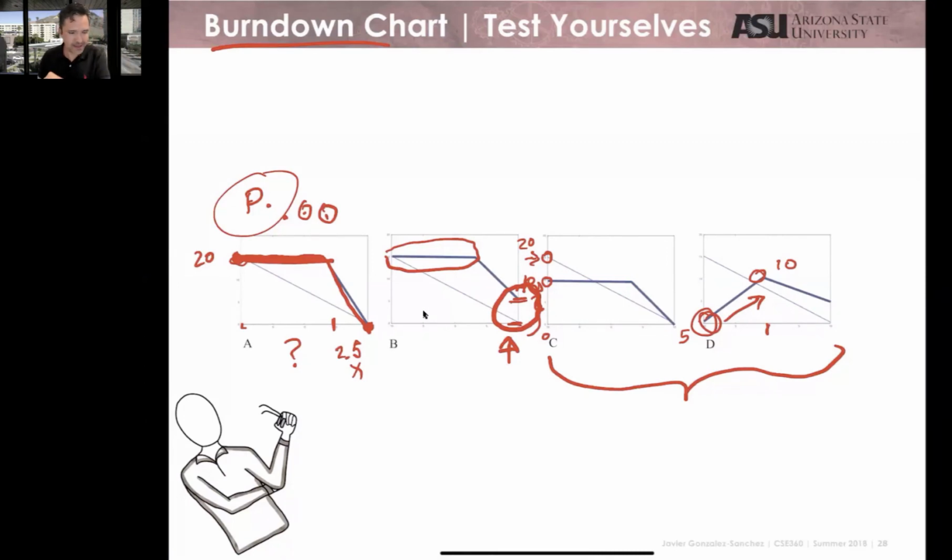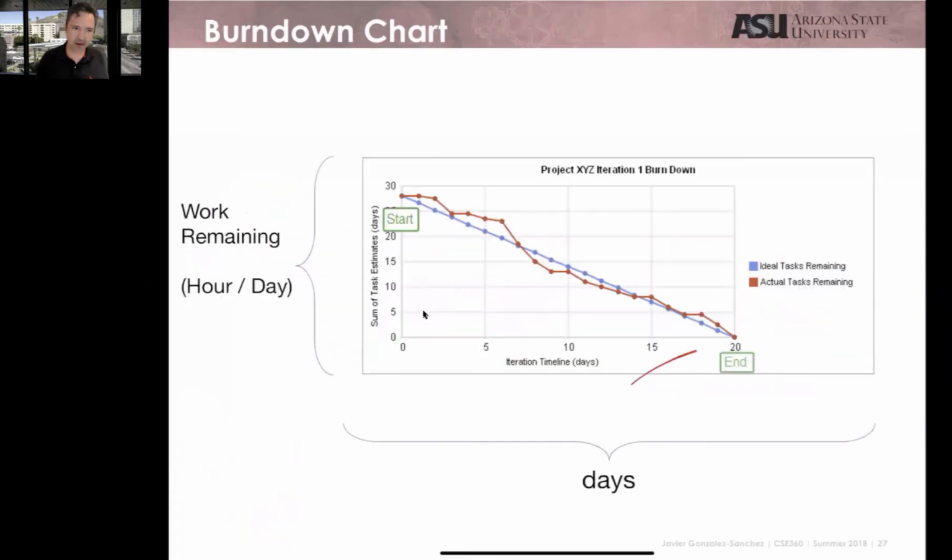The straight line is just kind of your baseline. It's just to let you know whether you are up or you are down. It's just a reference line, but it's a hypothetical line. It's not like you need to follow that one, right? It's the reference one and then the real one. The red one is the real one. The red one is the important one. The red one is the one that represents the team. The blue is just the hypothetical straight line connection between 2 points.